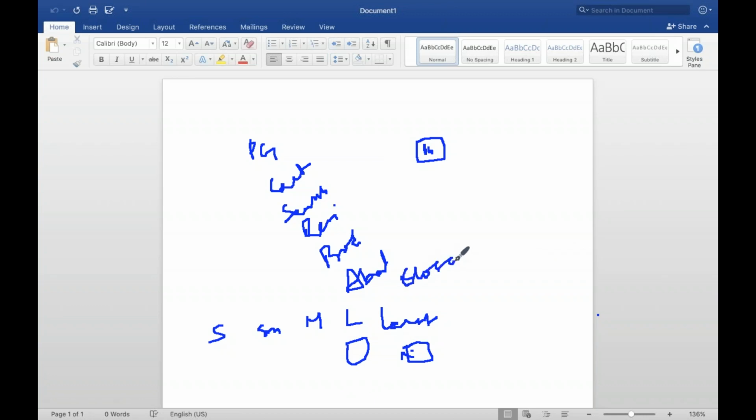Close button. Ashwin, I will answer your question at the last. How release consists of iteration estimated? I will do that. The close button. Where does it fall? Small, smaller, medium, large, largest. Small. So I will put it under small. Save button, maybe smaller, right? Search option, maybe large, right? Add to cart, maybe medium. So I'm grouping all small under one category, medium under one category, all the features I'll be grouping.